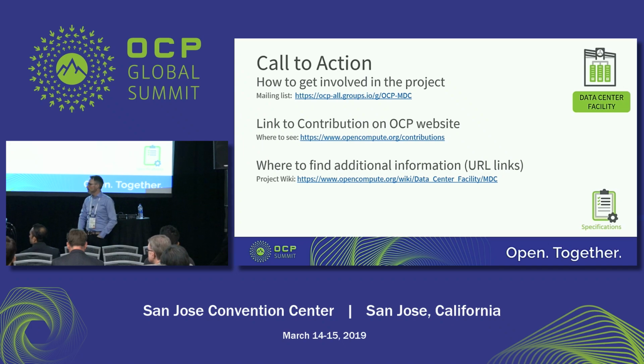Yeah, I was just going to add to that too. We've seen all those scenarios. We ship the modules without racks, and the customers bring their own in. Typically, we tend to deploy a lot with empty racks, and then we've had situations where they ship them with racks loaded, so we have an integrator come in and do the equipment integration. If you do that, though, you do need to take a strong look at the benefits in terms of cost, because we have to beef up the module a bit more to carry that load when you're shipping it, and also do some shock proofing on the racks themselves. So there is a cost trade-off that comes with pre-integration of the equipment versus the strength and the additional cost to do so. But it does happen. We do have customers that do that.